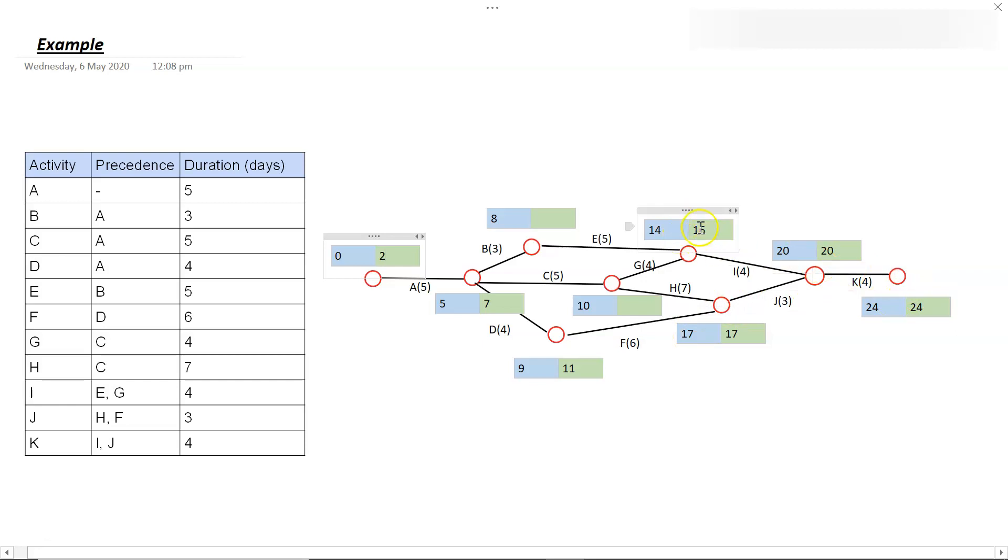So let's continue from here. This node here, if we went to this one in here, if we were to follow along, this one would get 12, but if we were to follow along, this one would get 10. So we need to not take 12 because we're going backwards this time, we're taking the shortest. So this will become 10. And then if we follow this path along, we'd have 10 minus five. So that would become five to this one. So we need to get rid of that. And then this would become zero, which is what we wanted.